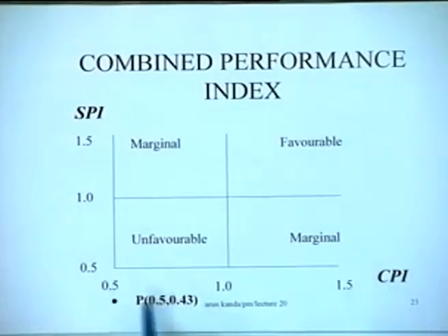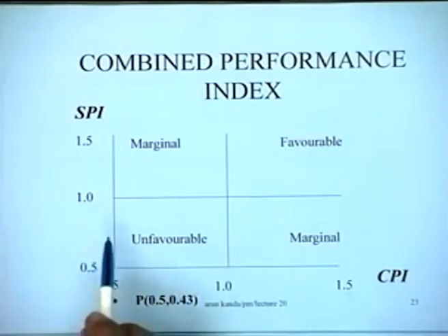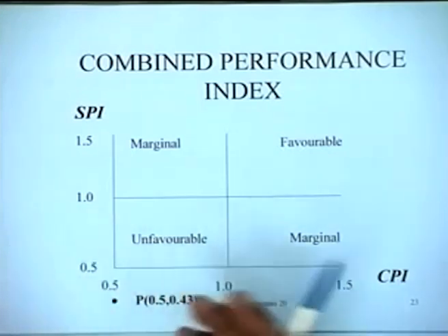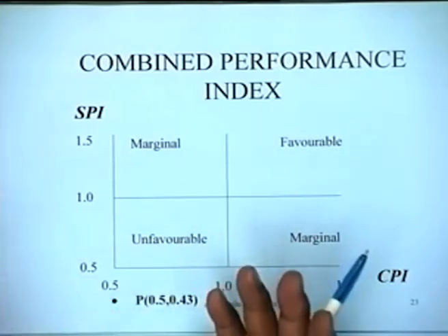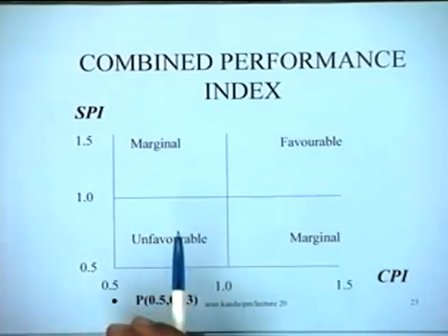So this is how we can get measures of the cost overrun and the time overrun in a project, based upon the performance report of the various activities from the site, which tell us what the individual performance of the individual activities is. Then we have taken the actual figures of the money that has been spent, and these are compared with the original plan, and on that basis we get these figures.